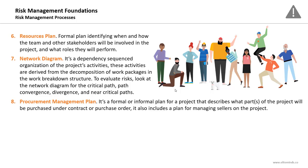The procurement management plan should be there as well. It's a formal or informal plan that describes what parts of the project will be purchased under contracts or purchase orders. It also includes a plan for managing sellers on the project. There is a strong relation between risks and the procurement management plan.